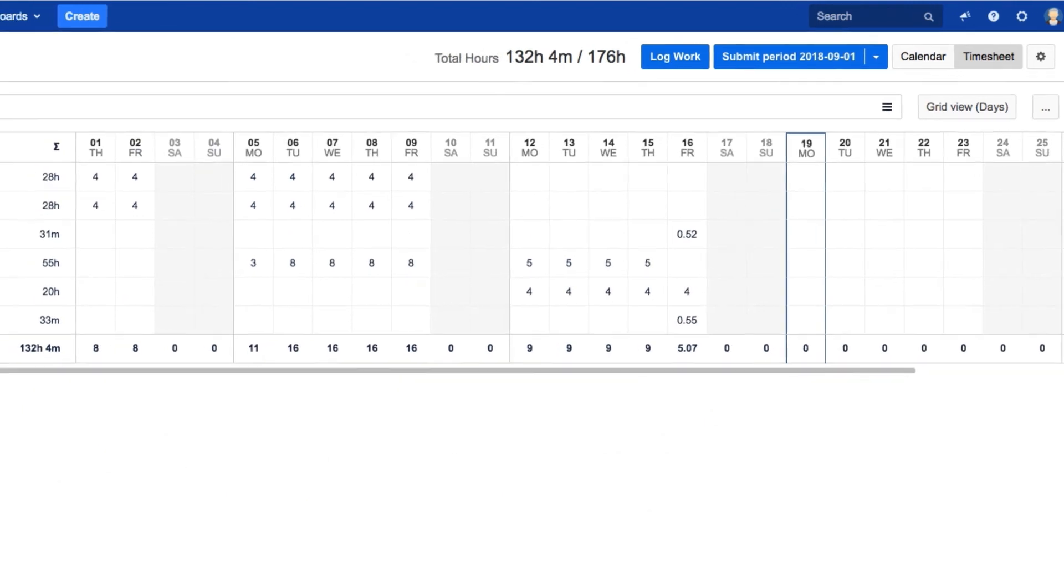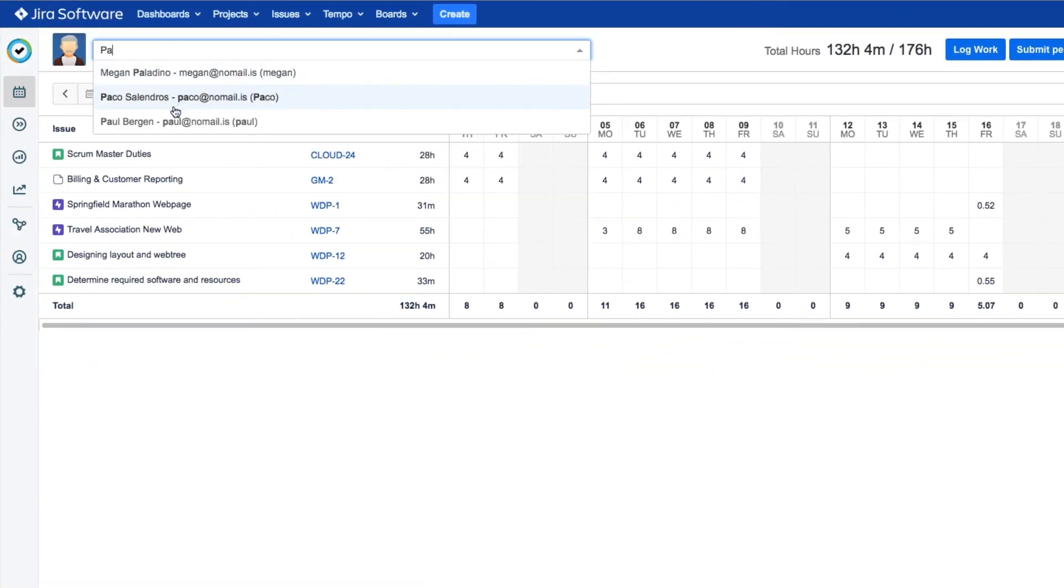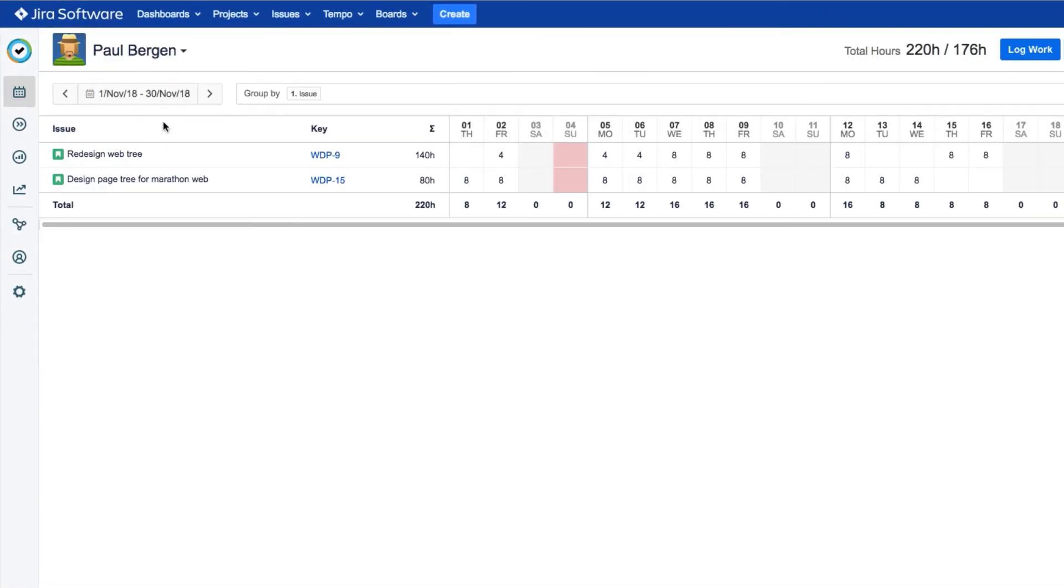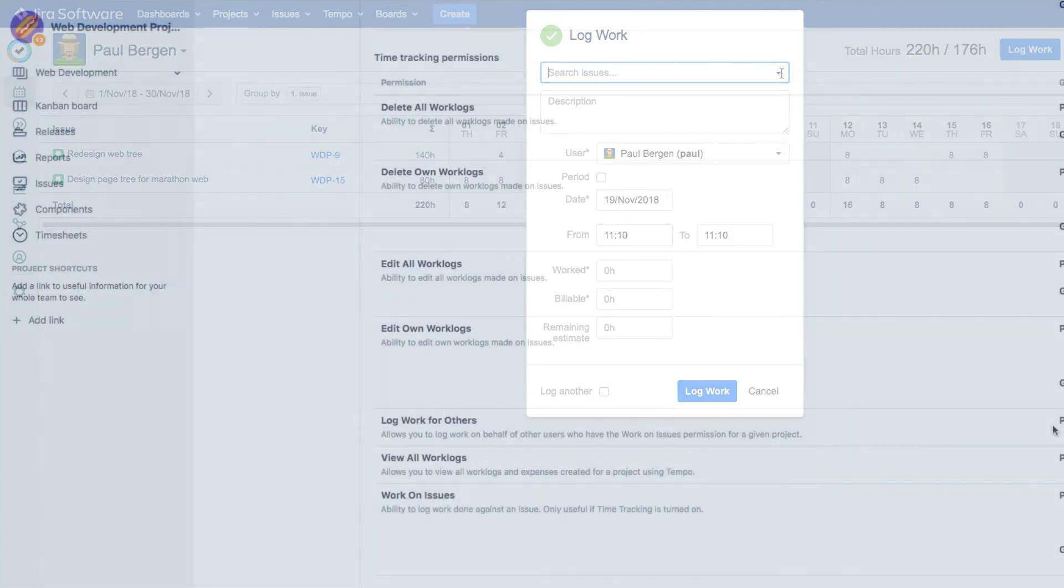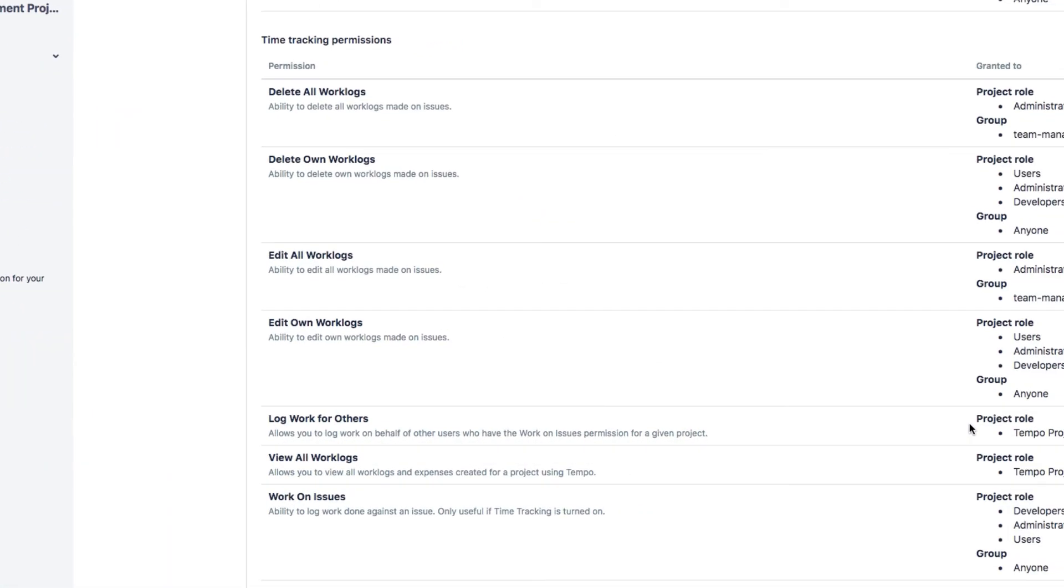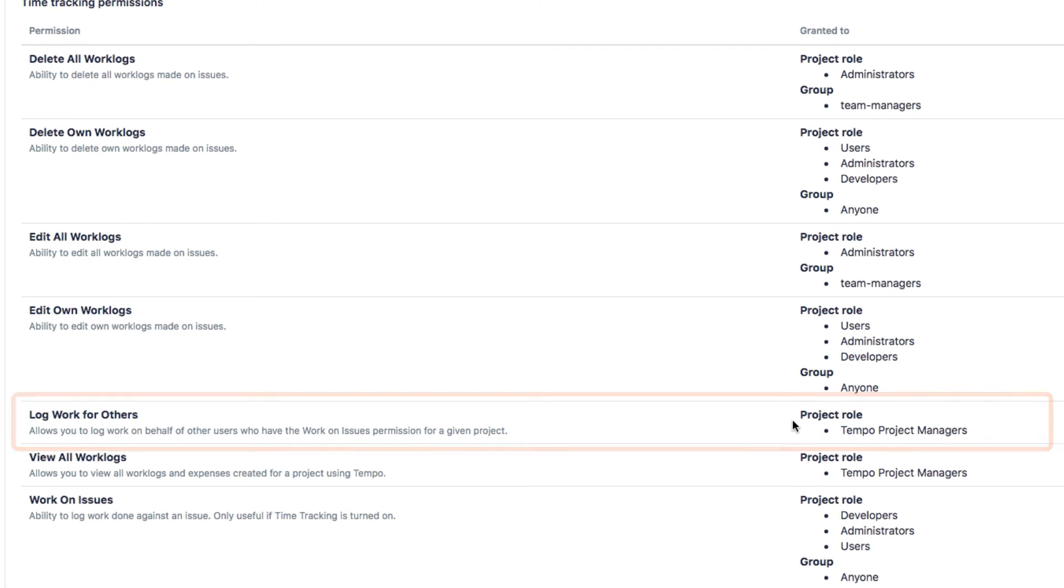Finally, if you're a team lead, you can also switch users up here to one of your team members, and then log work for them. To do this, you first need to have Log Work for Others permissions for your JIRA projects, which you can get from your JIRA administrator.